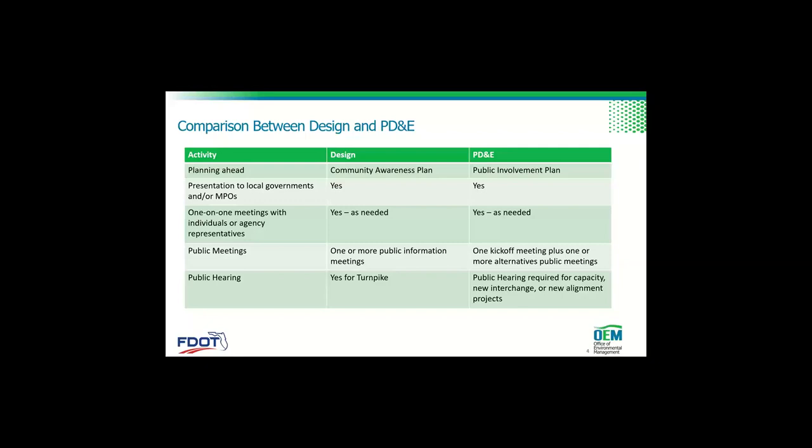During PD&E, you're probably going to have a kickoff meeting, one or more alternatives meetings, and many times a public hearing. I've been told that Turnpike does public hearings for all projects during design. In PD&E, public hearings are required for new capacity, added or reduced capacity, new interchanges, or projects with new alignment.